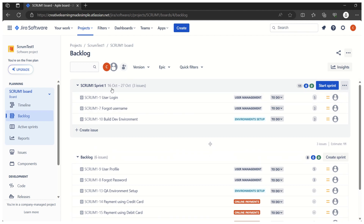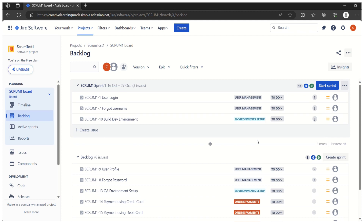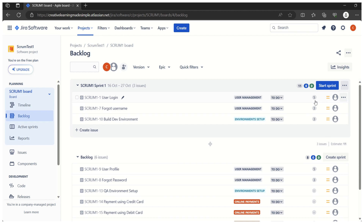This is the sprint we have defined — 'Scrum1 Sprint1'. Scrum1 is the name of the project, and Scrum1 Sprint1 is the sprint name. It started on 16th October and will end on 27th October. Currently there are three user stories in this sprint: 'User Login', 'Forgot Username', and 'Build Dev Environment'. The numbers we see are story points — five for User Login, three for Forgot Username, and three for Build Dev Environment — so the total work planned is 5+3+3 = 11 story points.